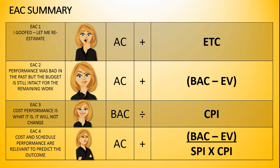So when you take a look at what we've seen so far, we have I goofed, let me re-estimate; performance was bad in the past, but the budget's still intact; or cost performance is what it is, it won't change. She's smiling because maybe her CPI is good. If CPI is one, hey, EAC is going to be equal to BAC. You figure out what I'm saying? If your CPI here is one, then your BAC is going to be equal to your EAC. All right? And then we've got the cost and schedule performance are relevant. That means you want to factor in the cumulative SPI and CPI. All right? So those are four formulas. I hope this helps you make sense of it.